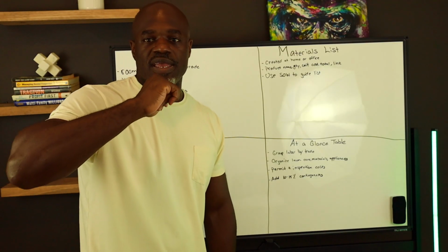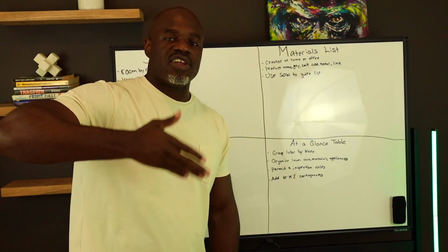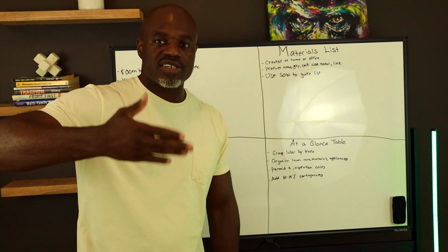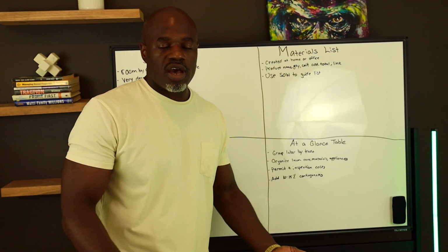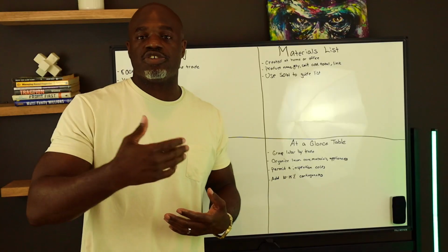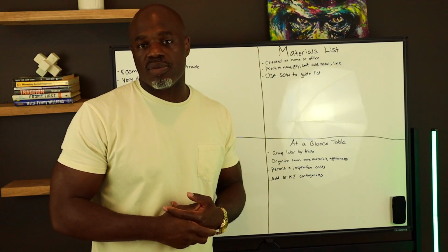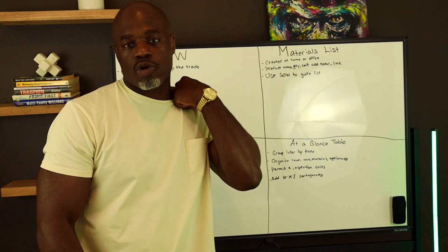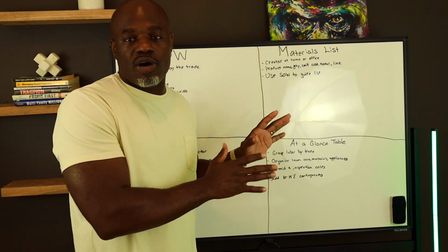So if you know this is going to be a 3-month project, your lawn care is $50 a cut. You're getting two cuts a month. Budget that. So that's $100 a month. So you need to be at least $300 to get you through the renovation. Maybe another $300 while it's on the market. Another 3 months, or you can drop it down $100 if it's another 2 months. Just don't forget small things like that.